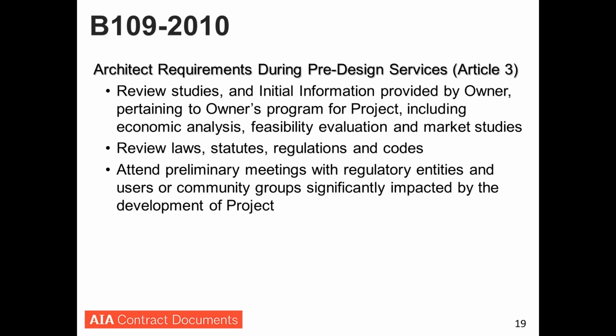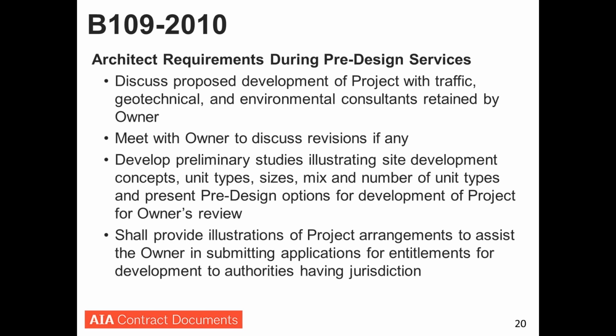Some other issues related to those pre-design services: traffic studies, geotechnical studies. Go ahead and show the next slides, Hosty. Revisions that are necessary to accommodate what an authority having jurisdiction might require of the project to move it forward, some preliminary studies about unit mix and size, and basically supporting an owner's development of the pro forma and convincing everybody that this is a good idea to move forward. But again, these are all things that take time and effort and shouldn't go uncompensated in the architect's world.